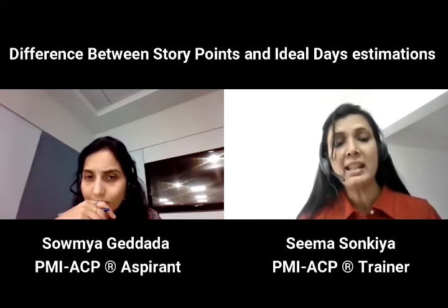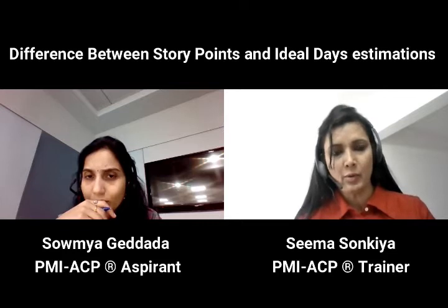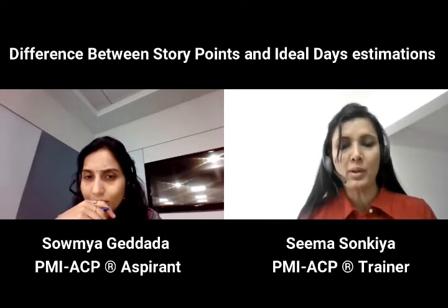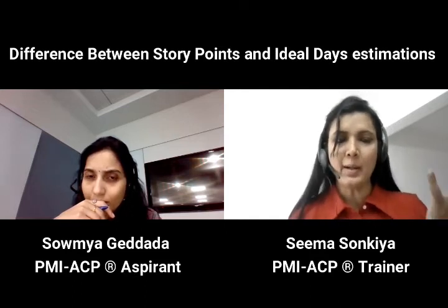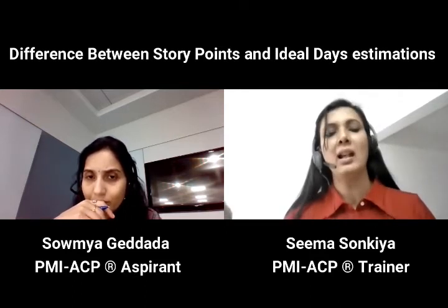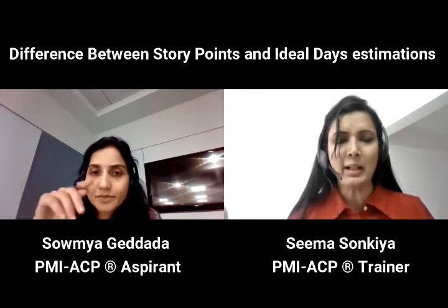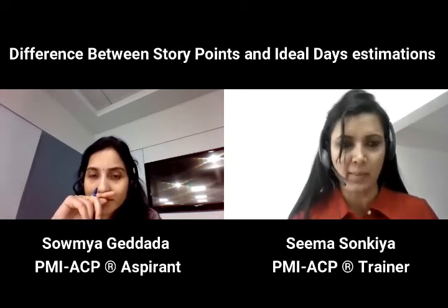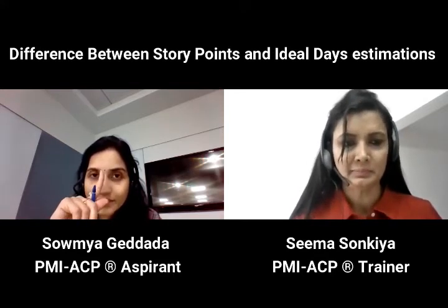For that, we need a reference work. Story point estimation is based on relative ranking. We have two works, and we compare the size of one work with the size of the other. Using that comparison, we come up with the story point estimation.